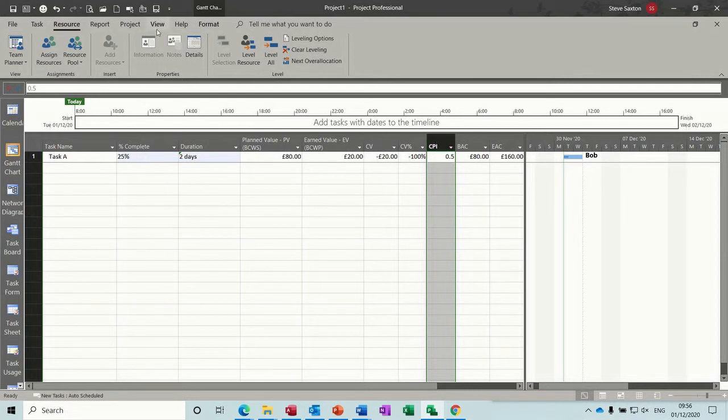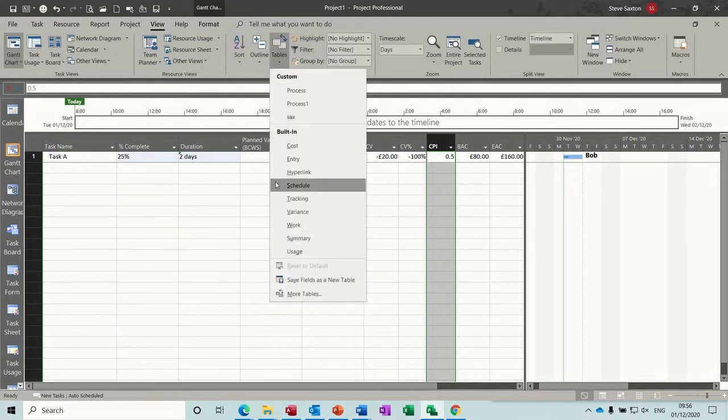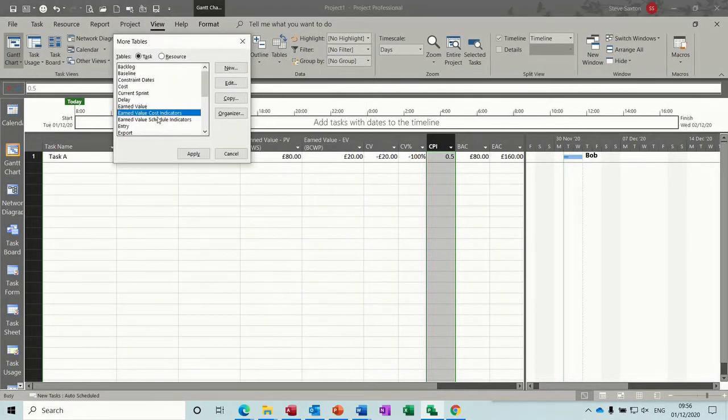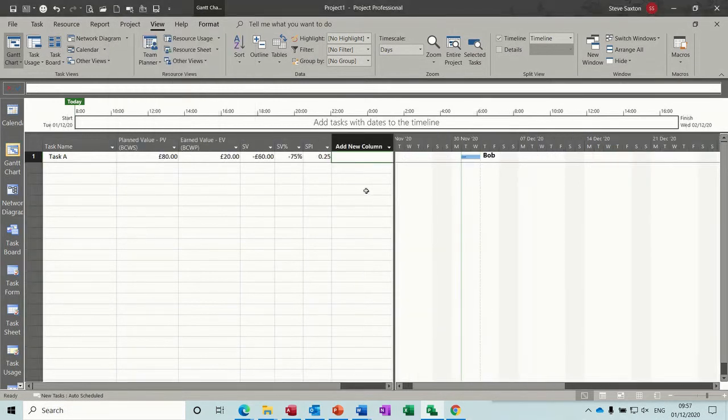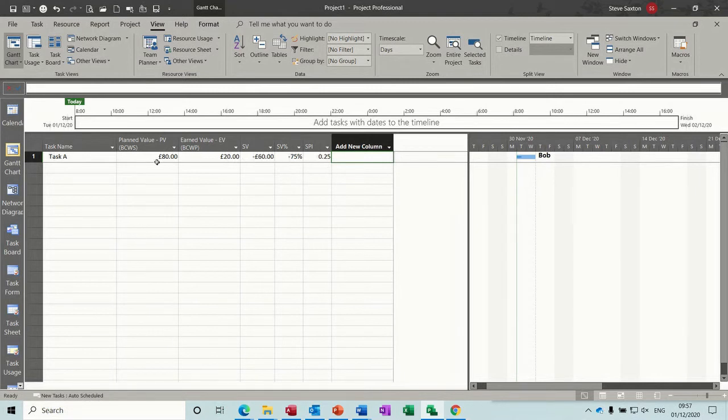And the other one, I'll just quickly put it on the screen, I'm not going to go through it, is the schedule indicators. And you can see it's already showing negatives there. Not as much stuff, but you've got a negative in terms of schedule in there. So this is the ratio of schedule variance to budgeted cost of work scheduled, expressed as a percentage. So you're behind schedule basically, and that's the same thing, only this wants to be a positive as well.